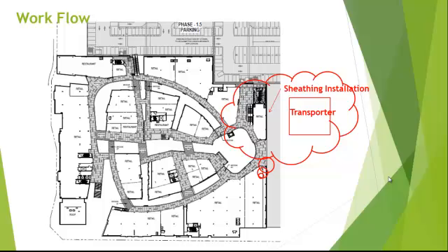The second recommendation is the transporter. He did spend a lot of time waiting for the installation. My recommendation for the future is to allow the transporter to come early so that he can stage the sheathing early on and doesn't have to wait during the installation process. So the 2 opportunities for improvement are, first, the tool, and second, the transporter's installation and his opportunity to go earlier.